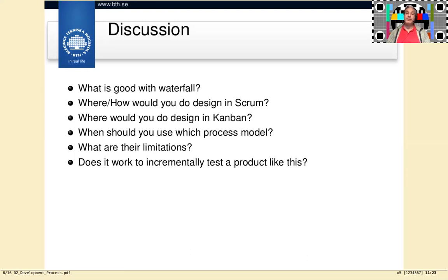use for. With Scrum, it is reduced simply because you only do the upfront design for the coming sprints. You only do upfront design for the coming 3 weeks. So if you waste that effort, it's not that big a waste. And with Kanban, you don't do any waste. You only do the design for the work task that you have. On the other hand, you lose the overview. You might lose the overview. So that would be the limitation of Kanban in that sense.